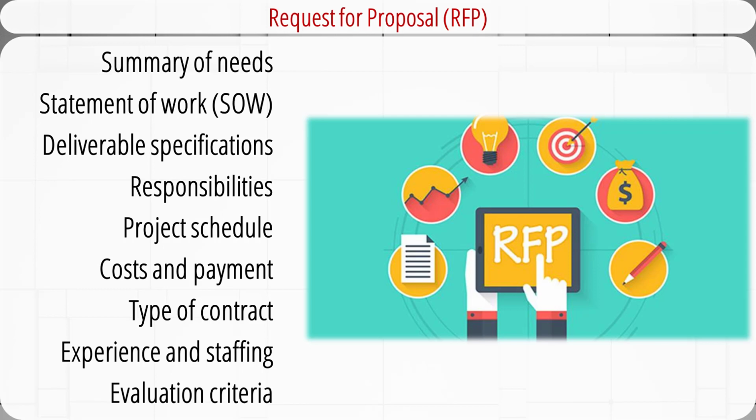There are generally two different types of contracts: fixed price contracts and cost-plus contracts. Fixed price contracts agree on a price in advance and it remains unchanged. It's preferred in projects that are well defined with predictable costs and minimum risks. The contractor must use care when estimating cost.